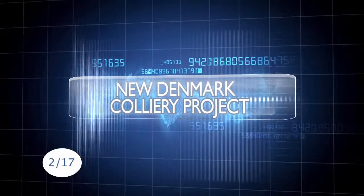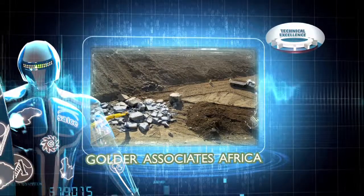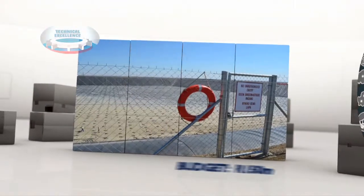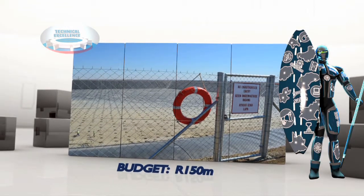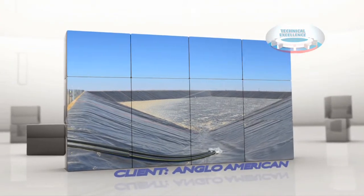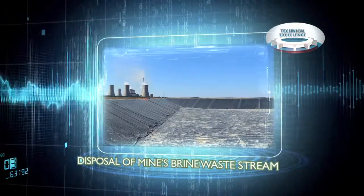Anglo-American Thermal Coal's New Denmark Colliery project. Gold Associates Africa submitted the design and construction of a 150 million rand brine pond for Anglo-American Thermal Coal's New Denmark Colliery project. The pond, which serves as a solution for the disposal of the mine's brine waste stream, required a footprint of 22 hectares. The project, which would ordinarily take 12 months to complete, was completed in just 7 months.